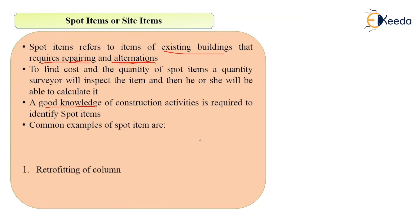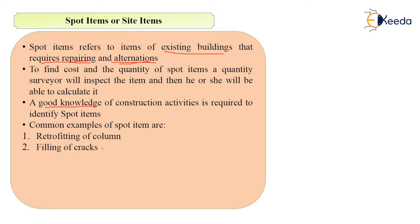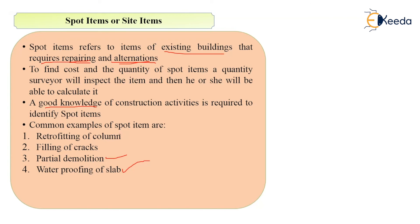Examples of spot items include: retrofitting of a column, filling of cracks in plaster work, demolition of a particular structural member, and waterproofing of a leaking slab. Spot items are only applicable to existing buildings, since new buildings do not need repairs or alterations. Items related to existing buildings that need repair or alteration come under the category of spot items or site items.